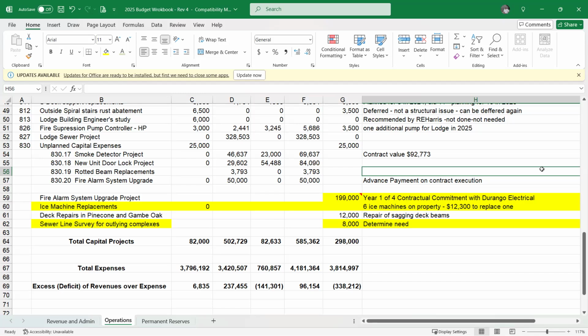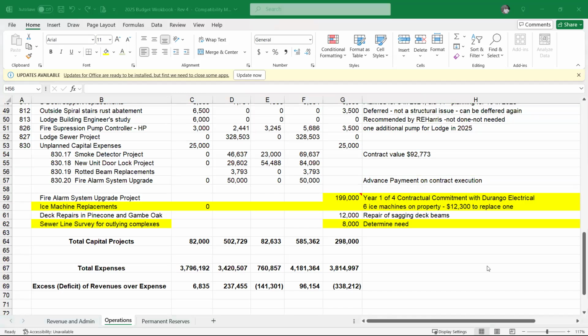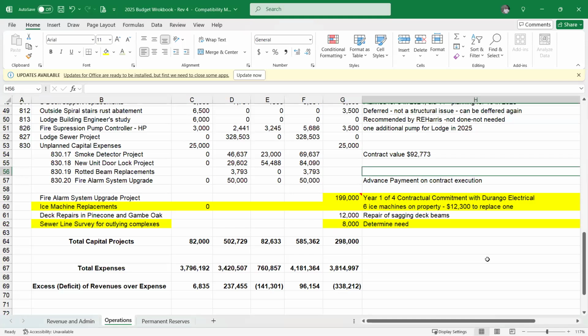I mean, they had terms in their contract about it. I think it was a bad decision to do that parking lot resurfacing in the spring, knowing that we had the roof project coming, because that asphalt doesn't cure in a couple of days. You can drive on it, but heavy machinery is going to tear it up as it did.